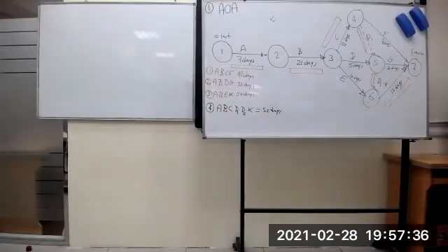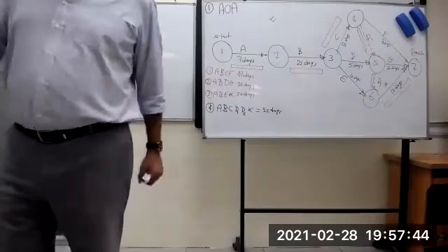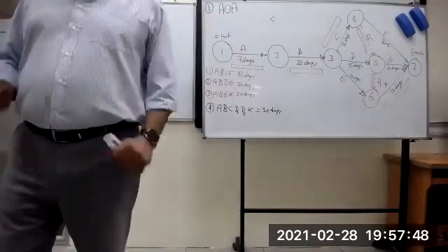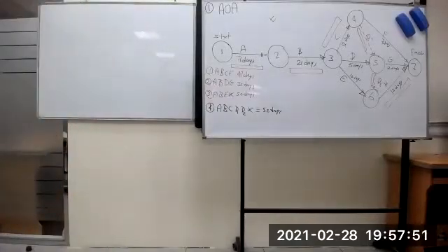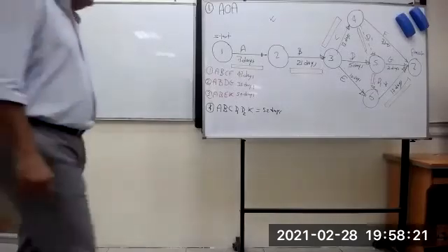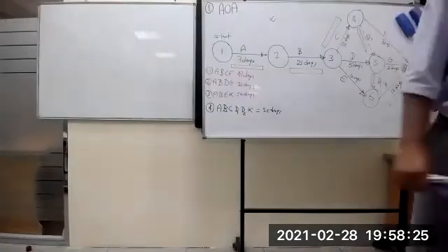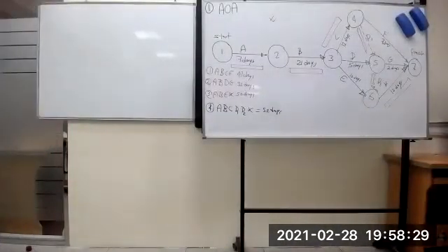We will discuss this one again, and we will give many questions in this area, because in our exam he will give you a lot of questions in this way. So it is better to enhance yourself and understand how to solve it, so you go to your exam with any type of question related to this and you are going to solve it on your own. To reach 20, you are at 6. How many days now? 6 plus 8 equals 14. And 6 plus 2 equals 8. The longest path, how many? 14. Easy going questions. Don't think that it is complicated. We will discuss it a lot more in 2 other techniques.